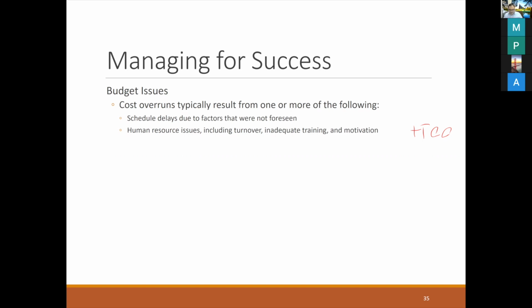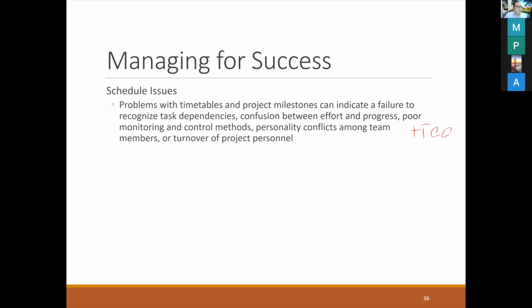that's why I told you that when the system analyst is doing their interviewing, the programmer must make sure that they are ready for coding the programs. If they are not ready, just send them for training first, because you have the time, as the task for programming has to wait for interviewing to finish first and preparing the program specification. That may take like a month, something like that, for the last project to be done.